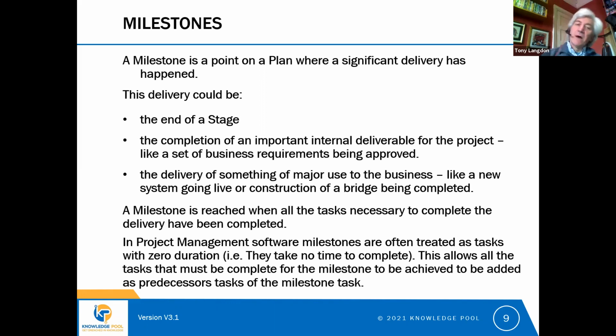So the end of design would be the end of the stage, and that could well be a milestone. Because you know that all of the thinking has been done, you're now ready to move into the doing of actually building the bridge, because you know what you're going to build. So absolutely, the end of the design stage for a bridge could be a milestone.